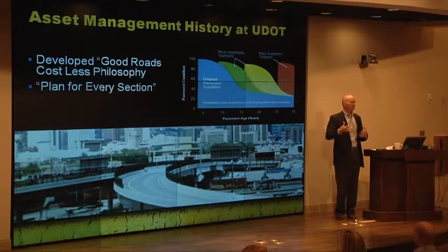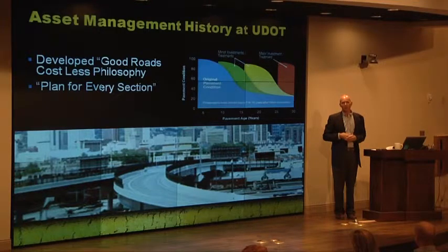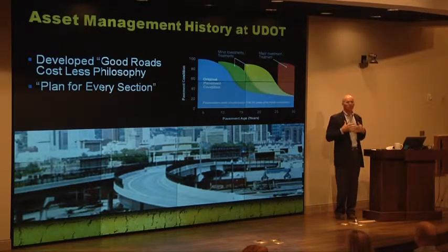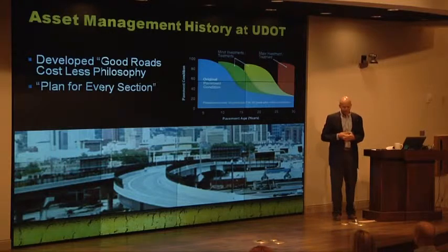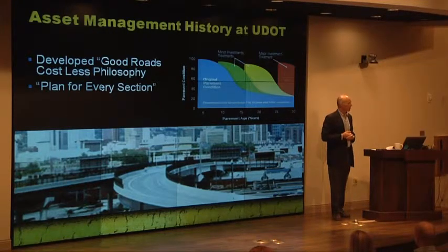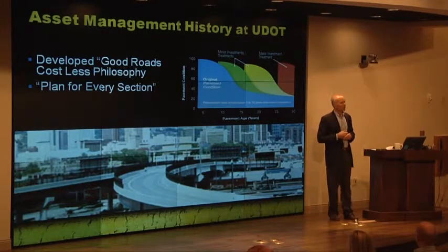And we had this thing called the Olympics staring us down the throat that everyone said, you got to get this job done before the Olympics. And being that we had no model to really look at for design-build, we designed in several what we called quality hooks. There were quality hooks like, well, everyone knows incentive, disincentive, but we had one that was a requirement that the contractor had to bid a maintenance contract.